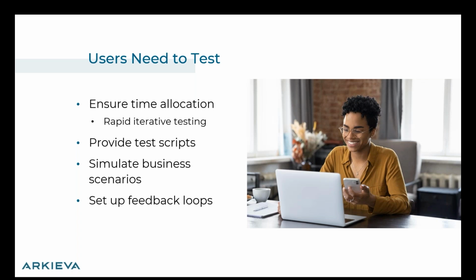The testing is also best done in rapid iterations. If they give us the feedback in the morning, by next day we should have an answer ready for them, an explanation. So there should be a very intensive iterative testing time period. Sometimes people need test scripts, and we can certainly get the vendor to provide you the test scripts.